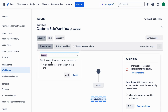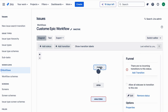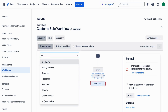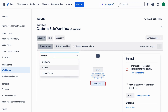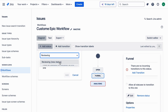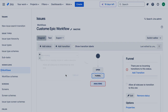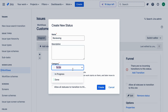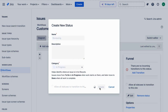Click on Add Status to start. Let's add our first status, Funnel — type the name and click Add. Repeat this process for each of the other statuses: Reviewing, Analyzing, Implementing, and Done.